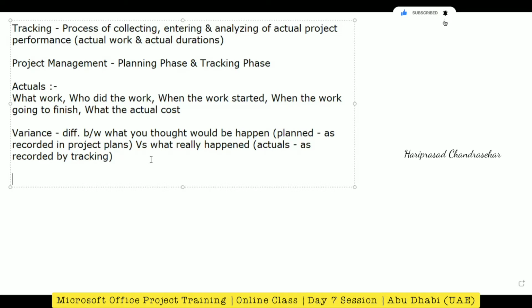Okay. For this, there is something called estimates versus actuals. Tracking in Project consists of entering information about actuals, such as the actual start date, actual finish date, and actual duration of any task. When you enter this information about actuals, Project shows you a schedule with some projections of how the remaining schedule is going to be completed.